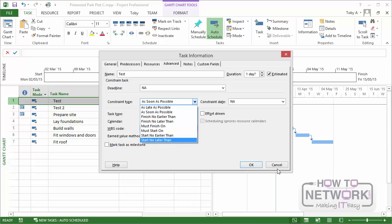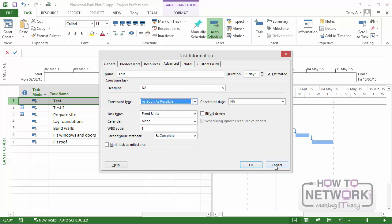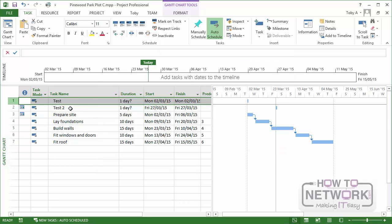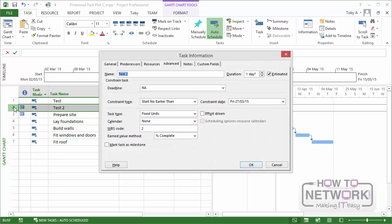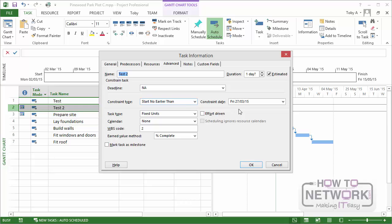Now let me just cancel that task information and look now at test two. This is the task that was added at the current date after I changed the project options. Let's have a look at the task information for that. This one has a constraint. And the fact that the date that the task was created to start on, today's date, is not the project start date means that project 2013 automatically added a constraint type that says start no earlier than today.